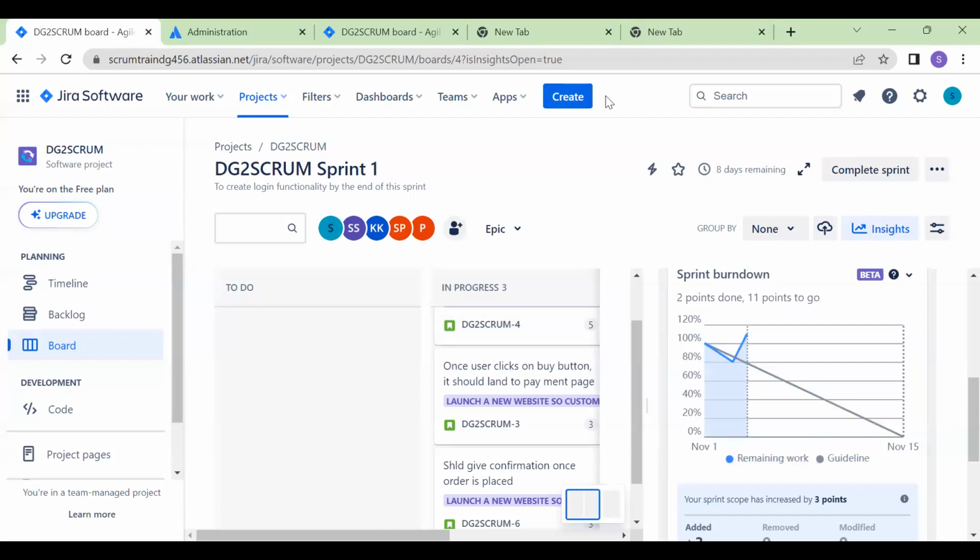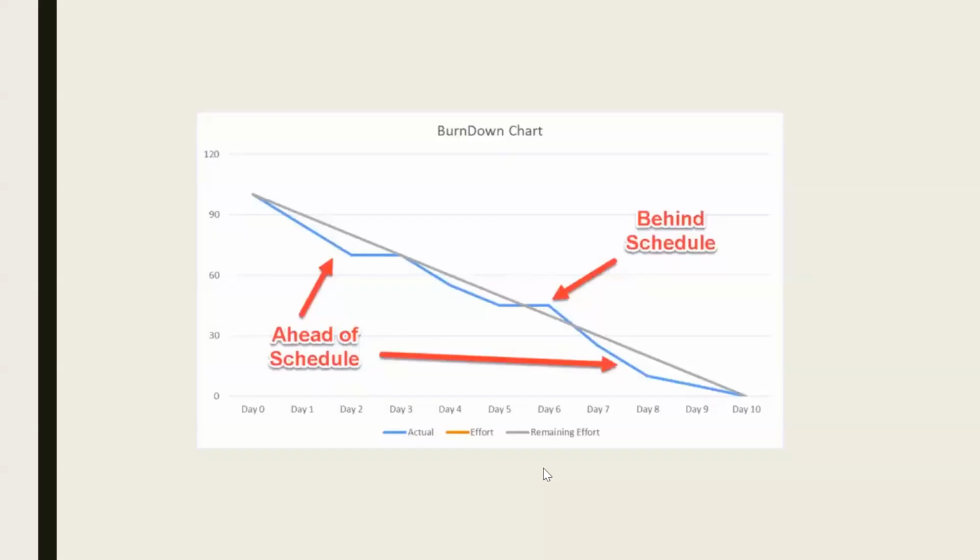Okay. Well, I will share another screen. One of the questions people ask you is: do you think it's good practice to assess your team's performance depending upon the velocity or on the sprint burndown chart? No, it's not a good practice to assess your team members on that, because sometimes, let us say, for the first 2 sprints, they might have delivered very nicely, and all the charts may look very perfect and good. But we don't know what is going to happen.